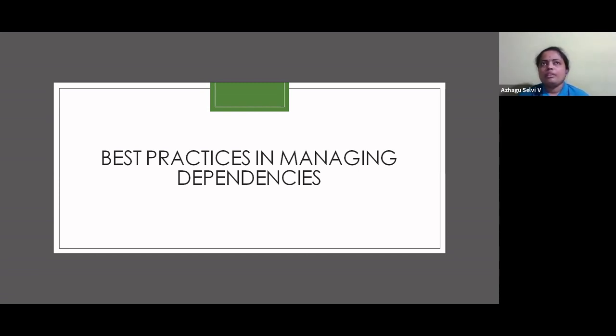Now, say for example, we have one more Scrum team who is working on some platform. They are the team who are going to deliver the platform, and I am on the platform consumer end, which means I am working on an application. My application is actually going to be deployed on that platform. So here it's a known thing that there is a dependency. What sort of dependency? Without that platform availability, I cannot actually launch my application, even though my application is ready.